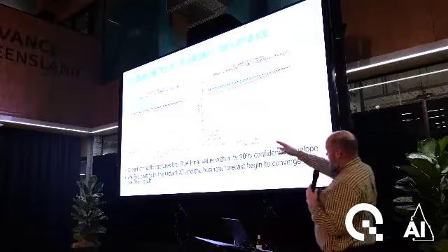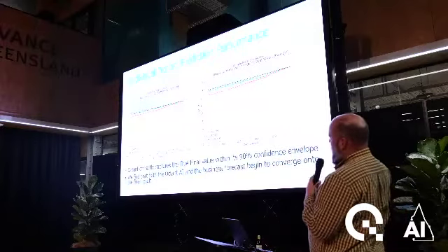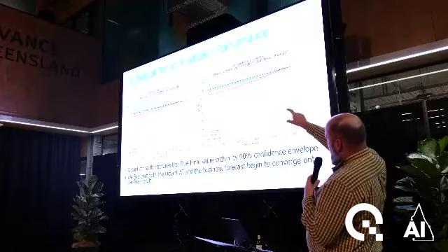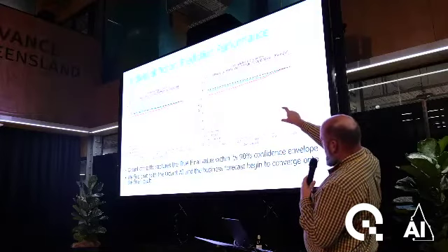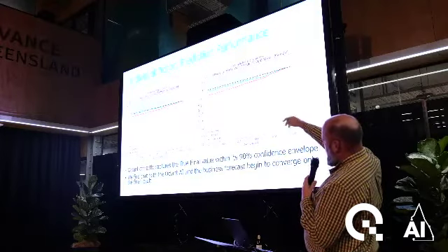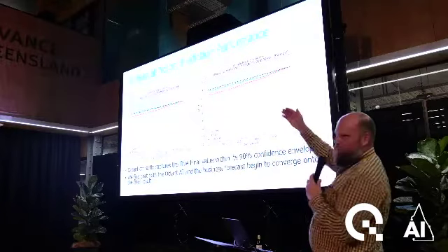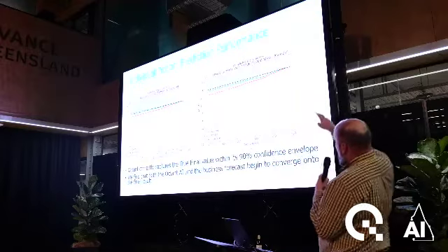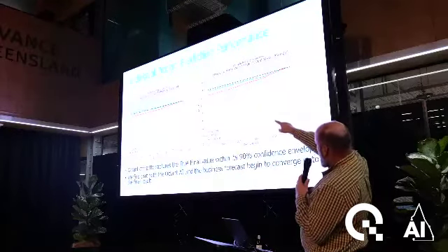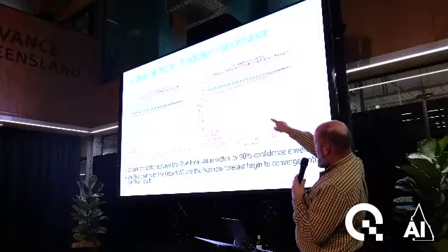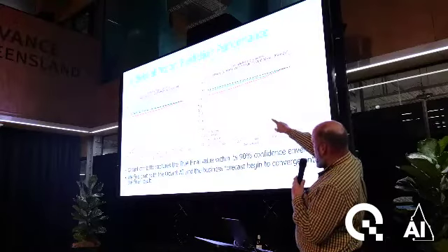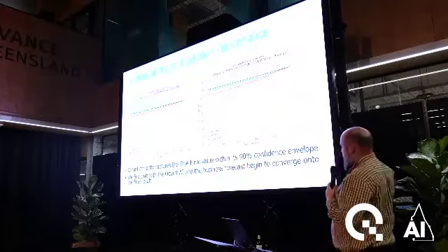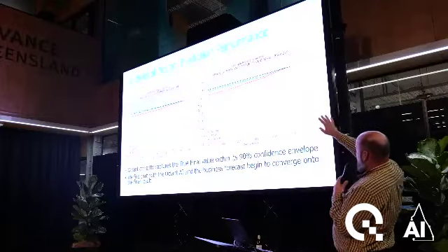And just like I said a few slides ago, here's an example with one customer where there's two projects, and using the model, you can see the green shaded region is a 90% envelope, going from P5 up to P95. So you should be landing there 90% of the time. The actual outcome was the black dashed line. The Octant P50 model, the P50 from our distribution, is this green line. And then you can see the red line, which is the business, which is always under-forecasting from the start. But they all tend to converge towards the end.